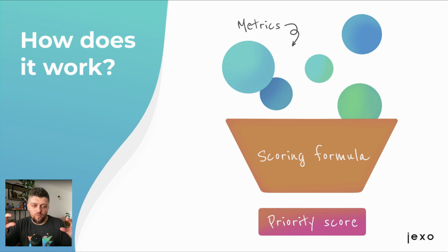There is a scoring formula that allows you to establish, let's call it, an integer scoring number for a specific issue. So rather than prioritizing and saying this is high, medium, low, you now follow a scoring model where, as an example, the highest number calculated from the formula is the highest priority, and then you have a more granular range rather than just medium, high, low. This helps a lot.